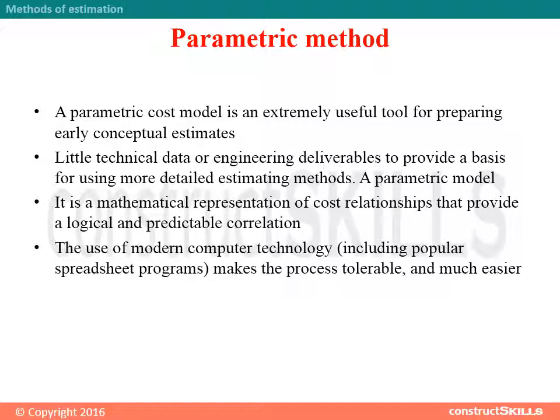Parametric Method: A parametric cost model is an extremely useful tool for preparing early conceptual estimates, requiring little technical data or engineering deliverables. It is a mathematical representation of cost relationships that provide a logical and predictable correlation. The use of modern computer technology, including popular spreadsheet programs, makes the process much easier.